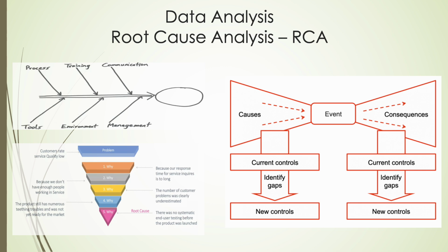There are methods and guidance on choosing the best root cause analysis techniques, such as: Number 1, the 5 whys technique is a simple but powerful method where you repeatedly ask why, usually 5 times, to drill down into the root cause of a problem. It helps uncover the underlying issues behind a failure by asking why an event occurred, then questioning the response, and continuing the process until the root cause is identified.